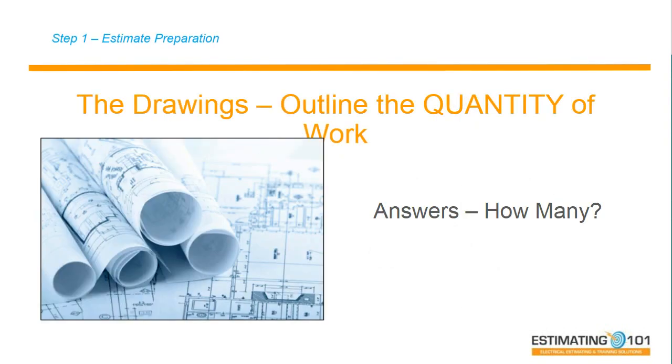The drawings outline the quantity of work. There are 3 questions that estimating should answer. It was in the landing page of the webinar. We're not going to cover a lot of it, but it answers 3 questions. How many? How much do they cost? And how long will it take to install them? So the drawing tells me how many.